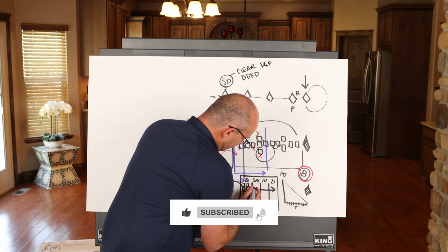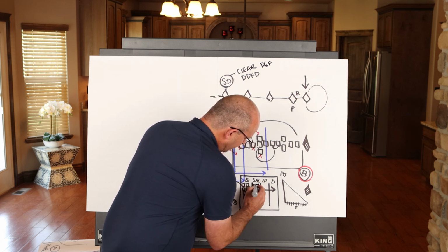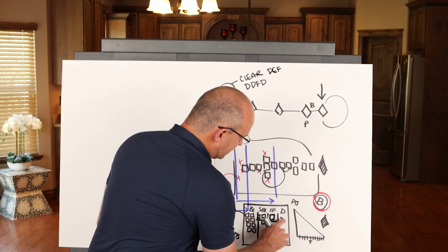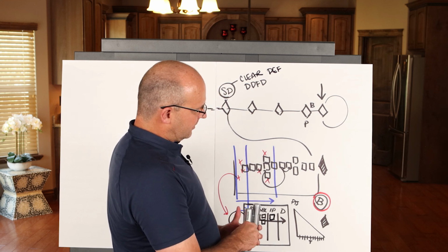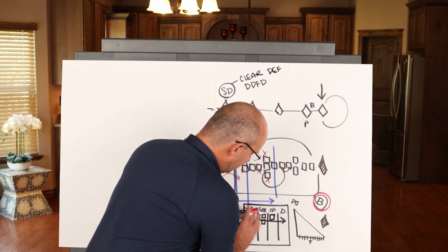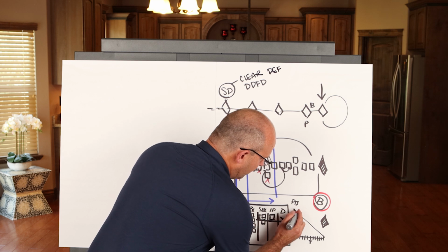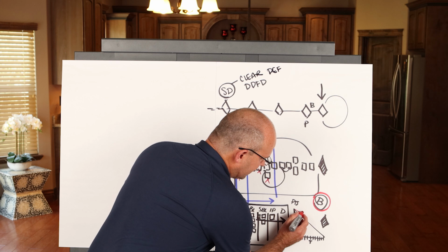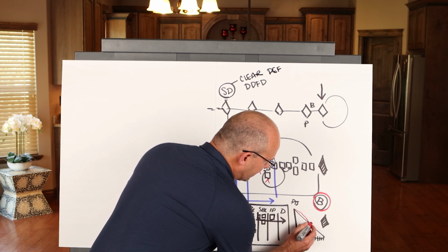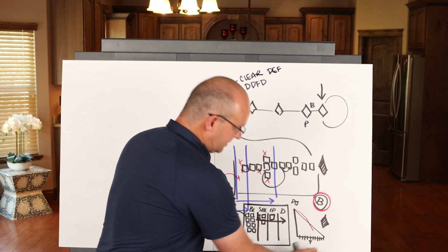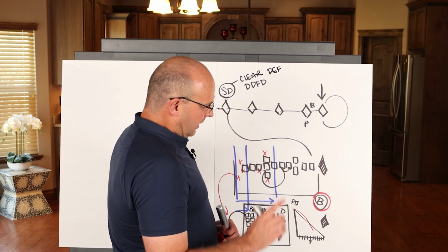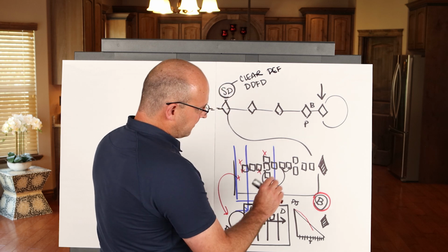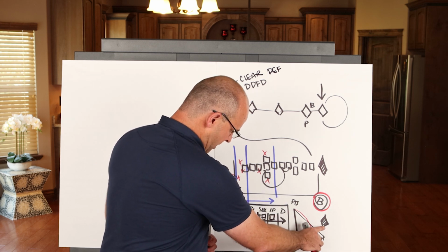every week you move tags or activities over here to the right to say, these are the ones we're going to do this week, these are the ones in progress, and these are the ones that are done. Every week when you're done, you can say, okay, how many did we accomplish? Okay, we only accomplished a certain amount. Okay, not enough. Okay, next week we did better. Okay, this week we're back on track. Okay, now we're ahead of schedule. You can use this trend chart, this Burndown chart, to make sure that you're on track, because you know you're accomplishing a certain amount of points on a weekly basis and on target per your deadline.